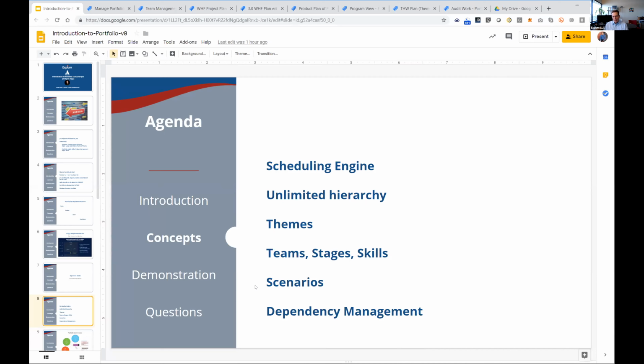But you get to play with that data, and then you get to decide whether you push those changes back to Jira. So you have the opportunity to have 3 managers, for instance, take the same set of data and plot a potential roadmap, decide which plan you like, or a combination of the plans that you like, and then make that your reality in Jira.